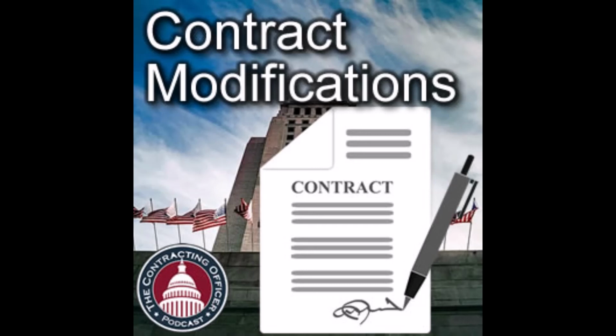FAR actually gives you an out on both sides to get around lengthy profit negotiations if it's the right thing to do. I'm not just saying go to sleep and follow the FAR. But FAR 15.404(b)(6), so yes, this is in part 15, says that if the work of the modification is directing is of the same type and mix as the current scope and relatively small dollars compared to the basic contract, the contracting officer can use that basic contract fee percentage as their negotiation objective.